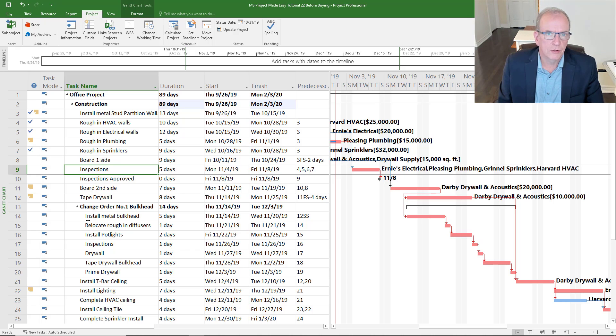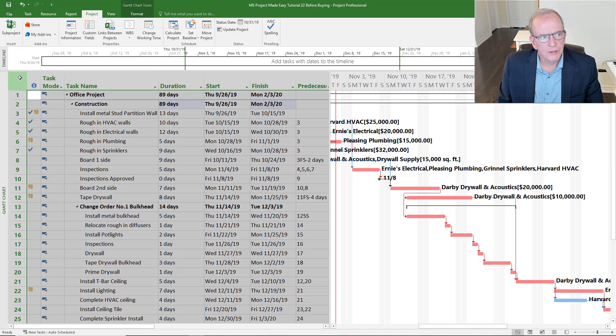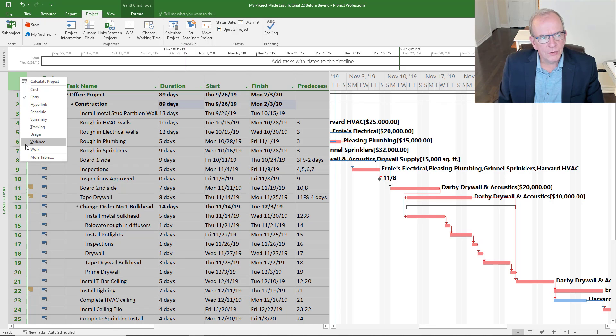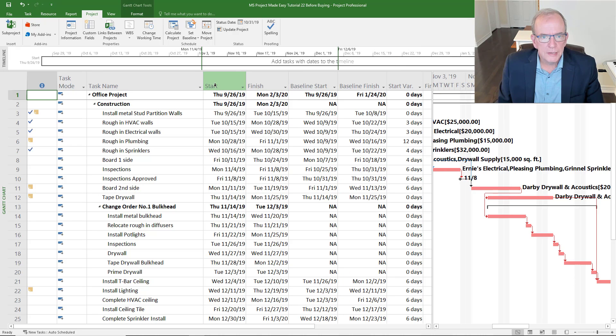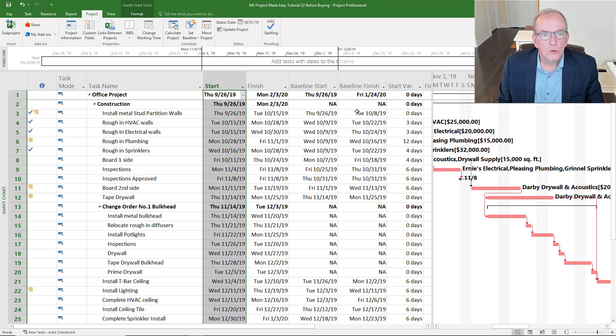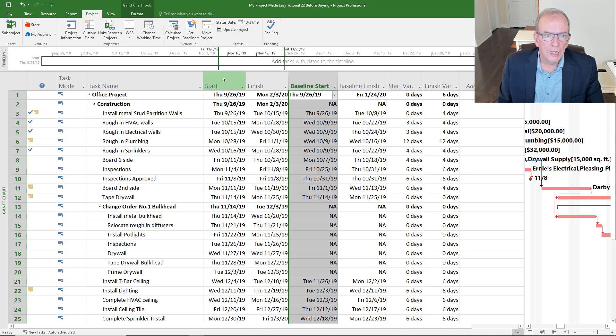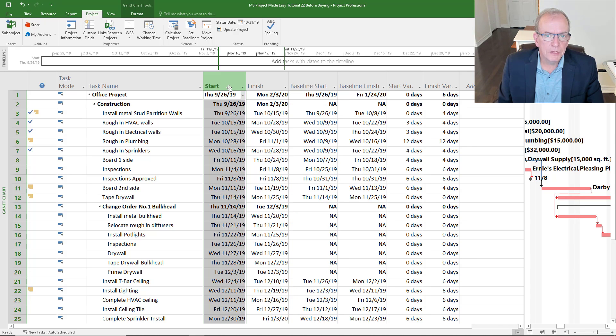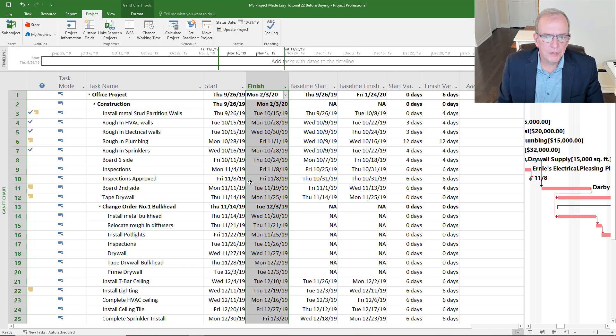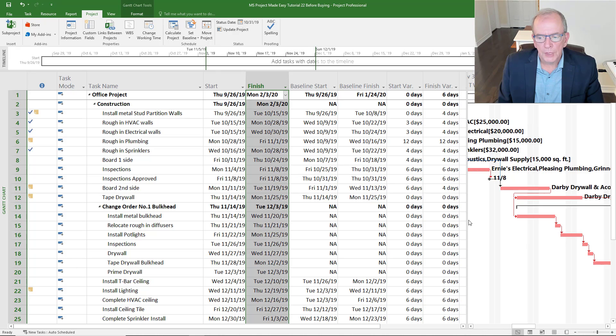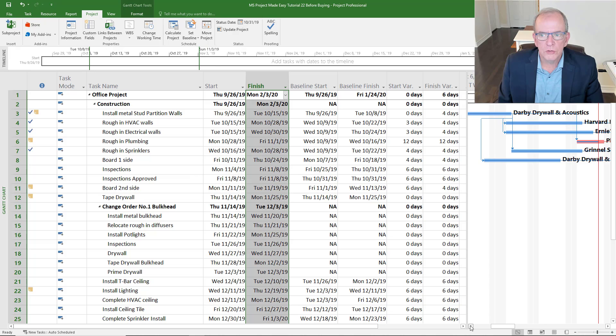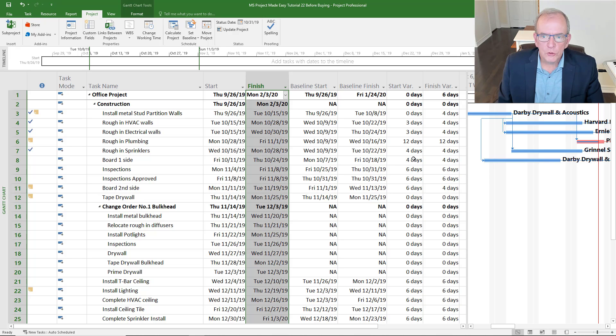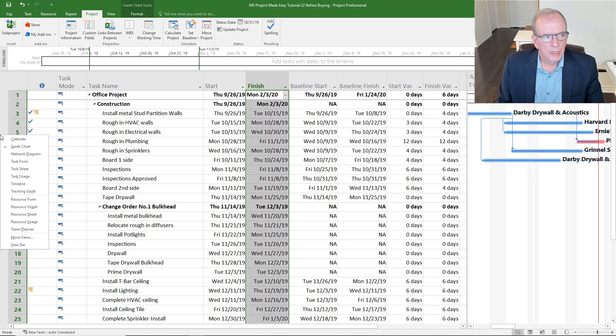So we have our schedule, we have our links, our predecessors, everything done. We have different screens. The variance screen - if you save a baseline, what it does for you is it actually copies and pastes those particular dates that you had put into the schedule. Baseline start, that would have been the plan, baseline finish, that would have been the plan. And as you update the schedule, when you put in actual dates later on, it'll show you what the variances are, how much your project schedule changed. That is really useful information.